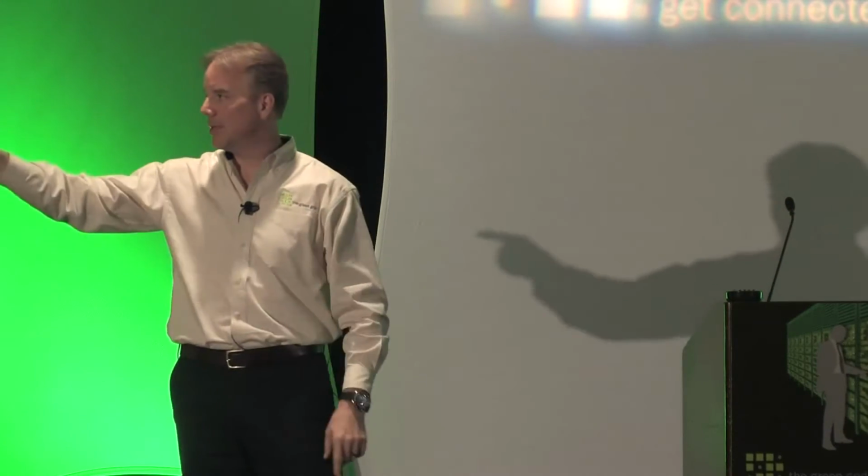The other side was PUE, using that as a driver for design of infrastructure. That's important. It's not an afterthought. It's not something you measure when you're done. It literally is, I have a target. You're going to meet that. I have success criteria for the design and the implementation construction guys that you're going to actually meet those numbers. If you don't, there's penalties. Pretty simple. So use it as the driver.